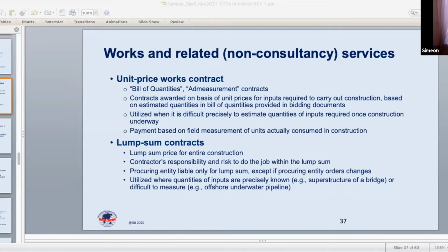Another item to highlight is the listing in the hierarchy of contract documents. Basically, what that means is that there is a hierarchical order of the various documents that compose the contract, the main parts being the general conditions of contract and the special conditions of contract. Special conditions of contract, since they are more specific to the particular procurement transactions, have hierarchical importance over the general